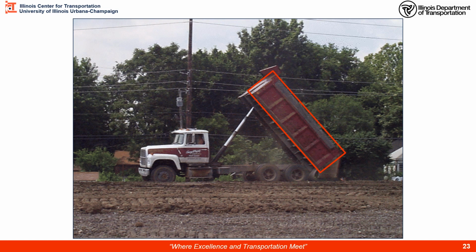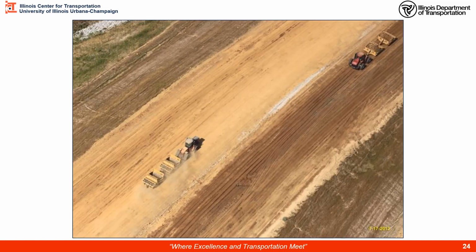So in order to pay for their labor, their fuel, and operation, contractors have agreed if we pay the struck capacity, which is the actual volume of the container, as if we took a straight edge and struck it off the top, then they are happy that they're getting paid enough to collect profit a little bit later down the road. Another example, maybe we have some scrapers with some pans on there. These are irregular shaped areas, so this might be one where I want to use a specification sheet.